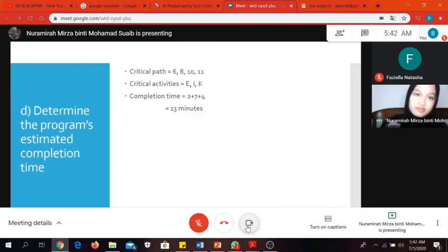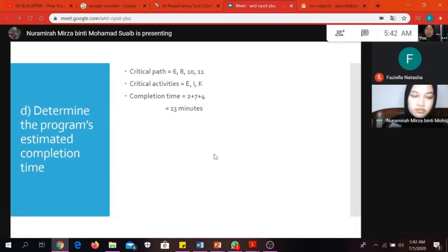Next, determine the program estimated completion time. Critical path 6, 8, 10, 11. Critical activities E, I, K, and completion time is 2 plus 7 plus 4. Completion time is 13 weeks.